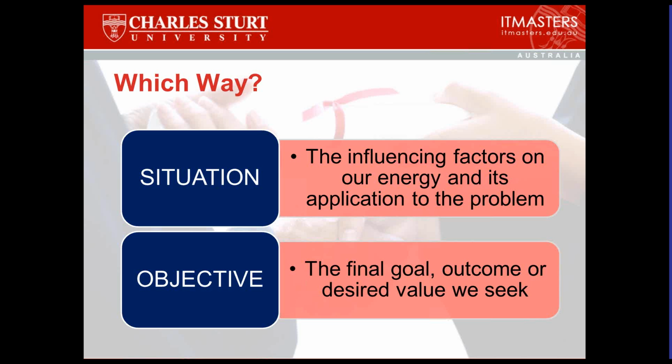So another question, someone is saying, Scrum is like discovering something as we go. Isn't it much harder to target a specific deadline? I'd throw this back into the discussion we just had about budget. You can make deadline a control variable. You can say, well, it's got to be done by Christmas. You've still got a variable to play with, and that is the outcome. Because that's where the uncertainties lie.